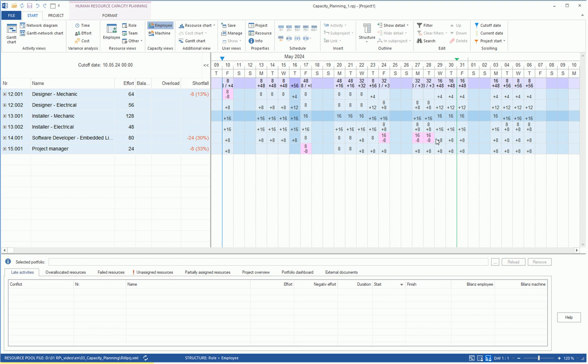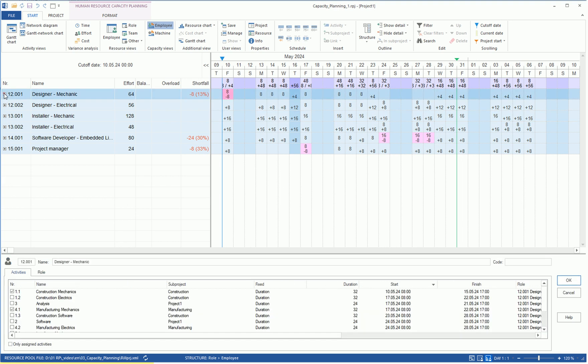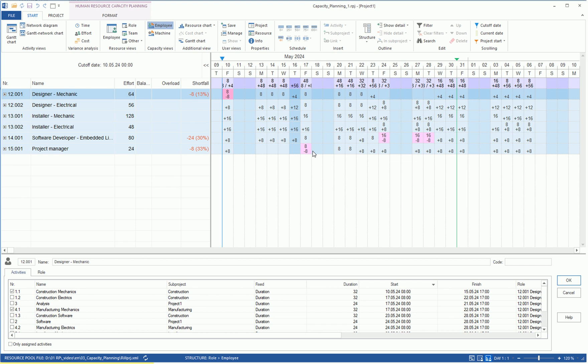Thus, Rilsoft Project signals to us that we have three shortfall cases. For the role of Designer Mechanic, we are missing 8 person hours on May 10th. Then, for the role of Software Developer, a total of 24 person hours on 3 days at 8 person hours each. And for the role of Project Manager, we are missing 8 person hours on May 17th.